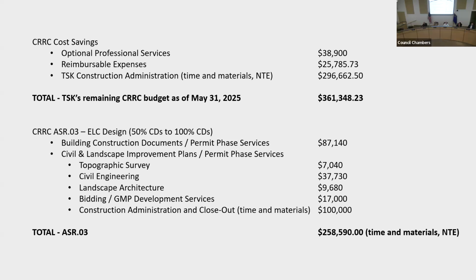So the difference between 50% and 100% is that 50% is one in which much of the basic design is done, as you saw in the floor plan, but they're still being circulated to the design team. So structural engineer, mechanical plumbing engineer, electrical engineer, telecommunications, food service, landscape architecture, interior and exterior designers are all still looking at it and making changes to make sure they have a complete plan that works and is ready to go to the building department for approval.